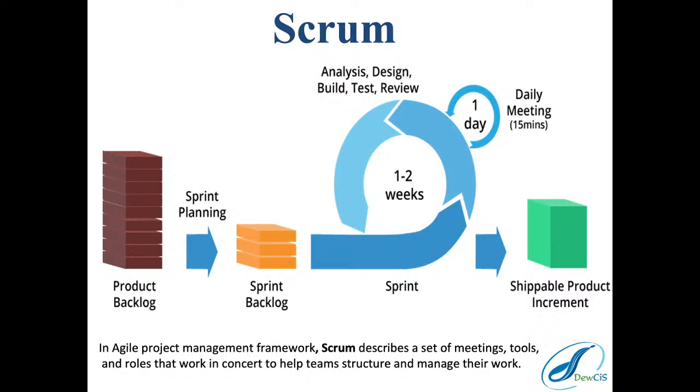Now once you have a product backlog, which grows at any time, so if anybody gets an idea, you write it down, so you always have a product backlog. Next thing is you have sprint planning. Sprint planning is where you pick specific items from the product backlog, or based on the analysis and thinking, get new things to do. And these are ideally the things that you do within the sprint.